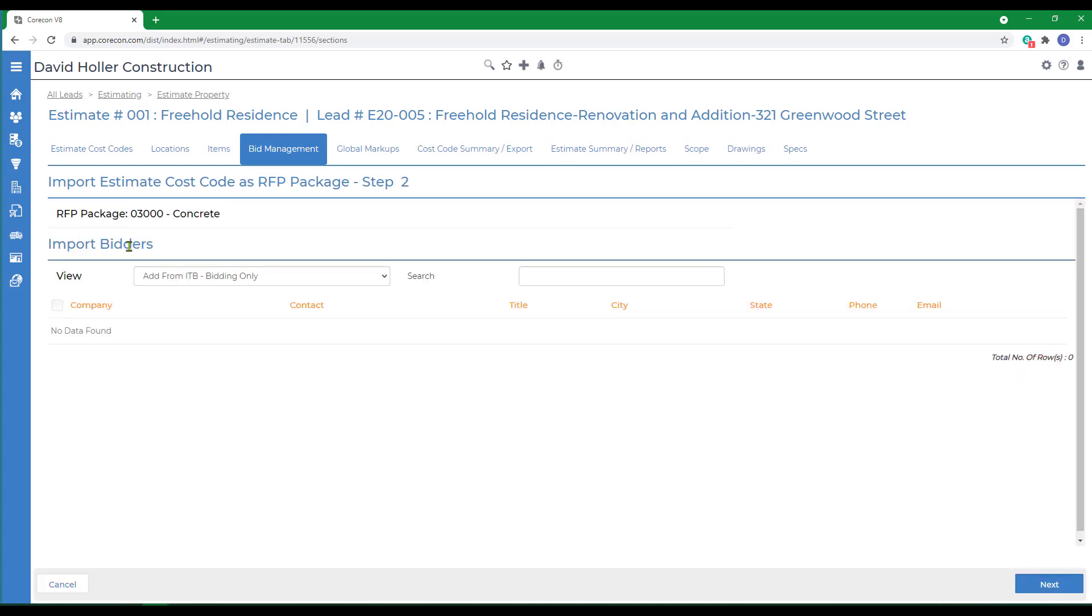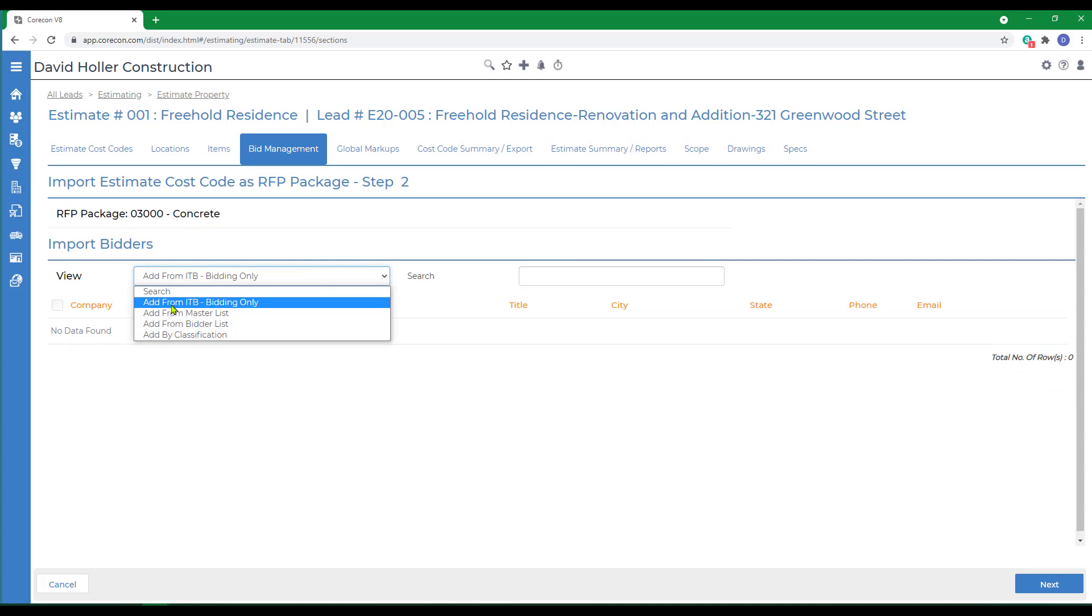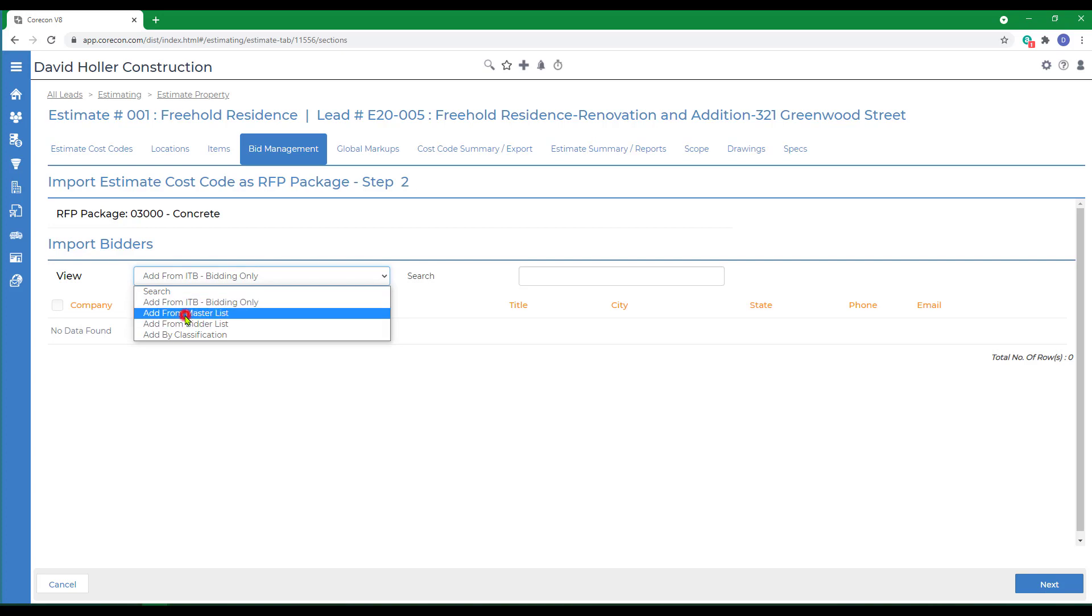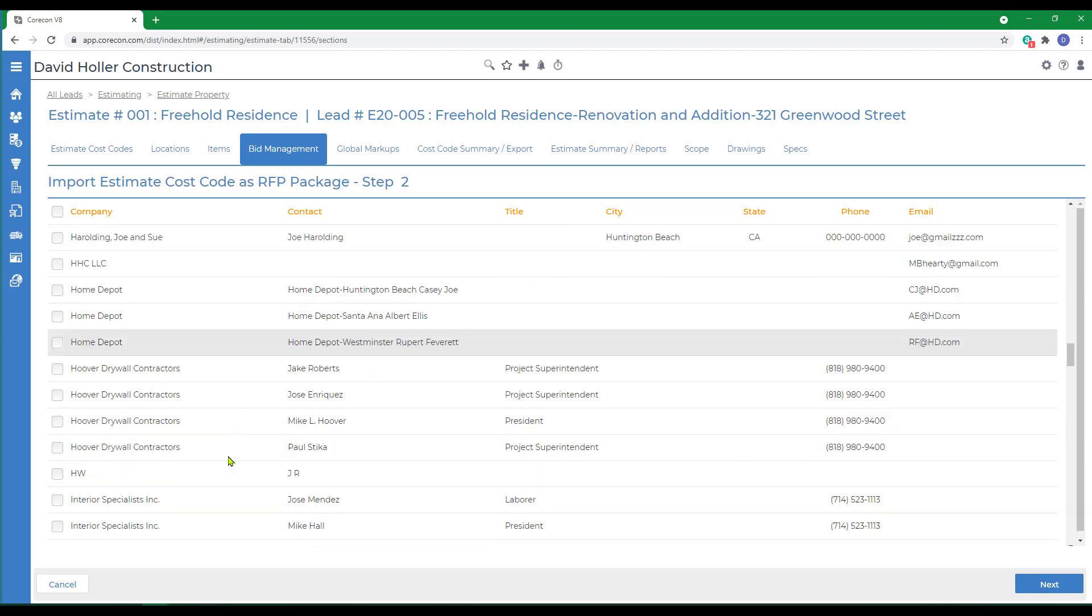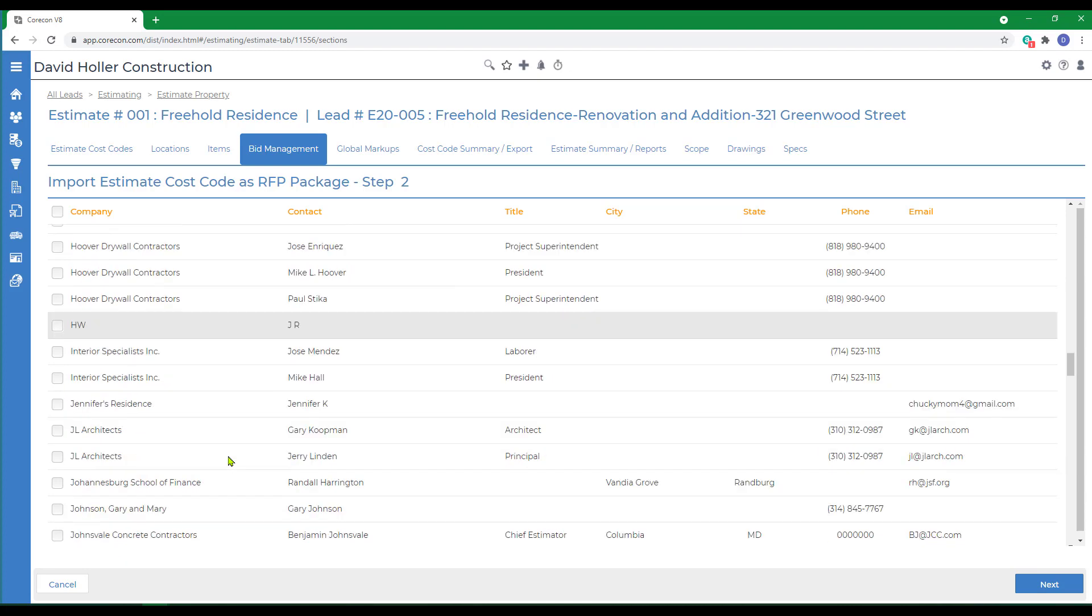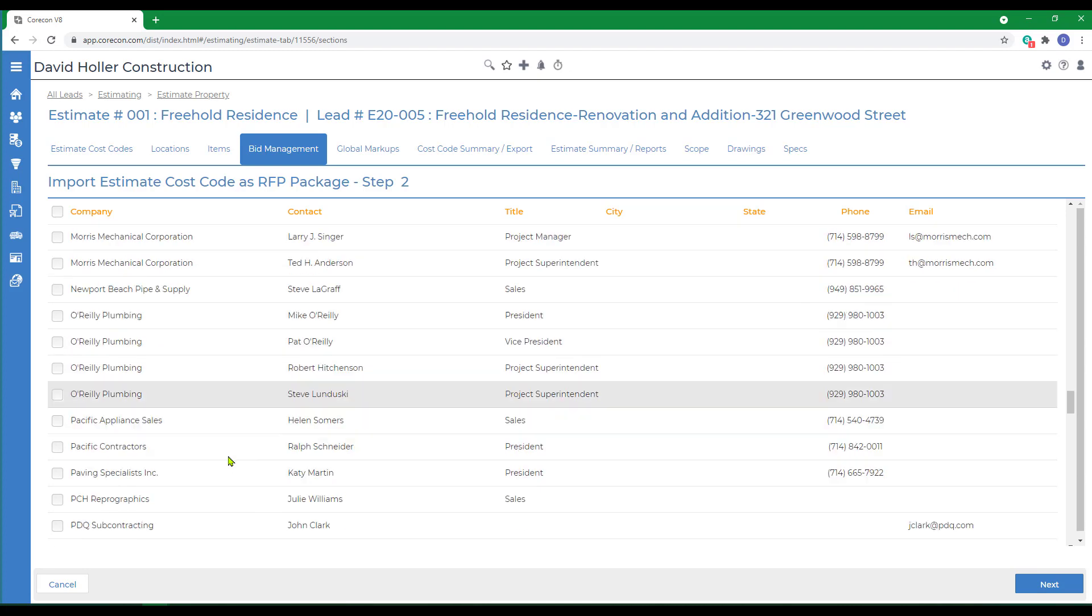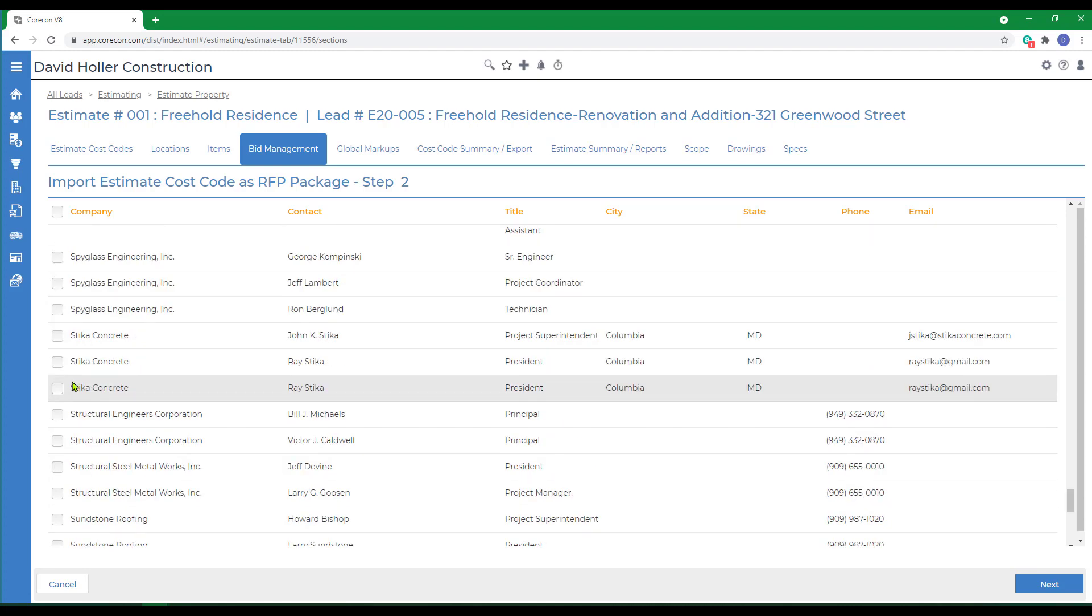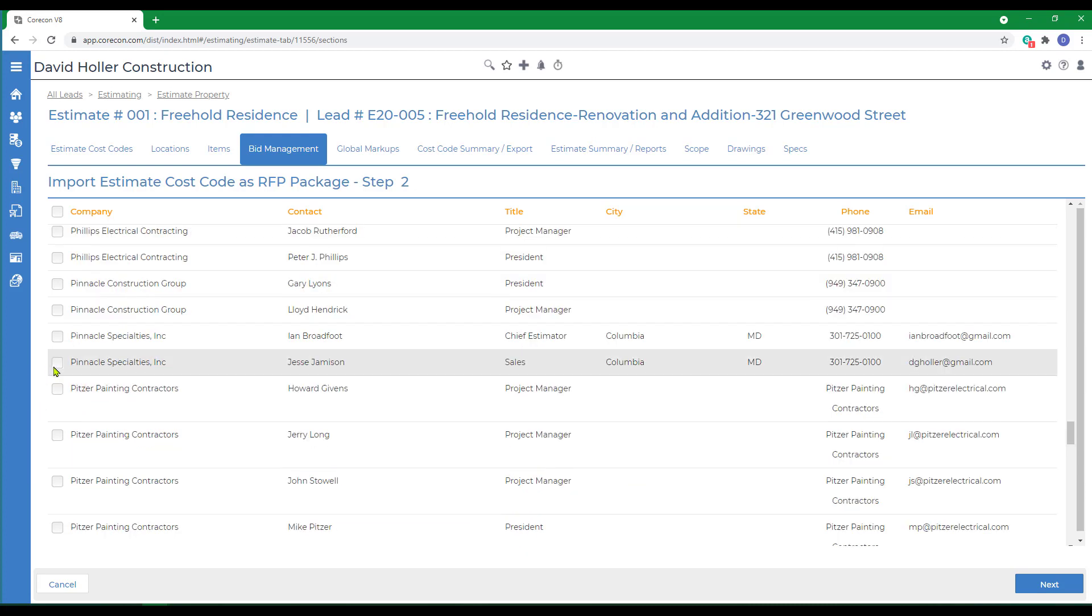The next thing, we're going to import the bidders. There's a couple places you can pull these from by classification, by bidders list, from the master list, or from other invitations to bid. I'm going to use the master list. We're going to ask two subcontractors to furnish and install all of the concrete scope of work. The first is Stika Concrete, the other is Pinnacle Specialties, and click Next.